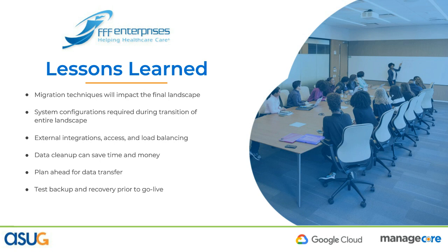4 less terabytes to transfer is a lot of hours saved transferring data. So you want to take that into consideration right out of the gate and even before you start your journey. And again, that goes into planning ahead for the data transfer. You want to make sure you have the right bandwidth in place. We're using the right methodology, using a data transfer versus maybe a cloud tool that will seed the data.